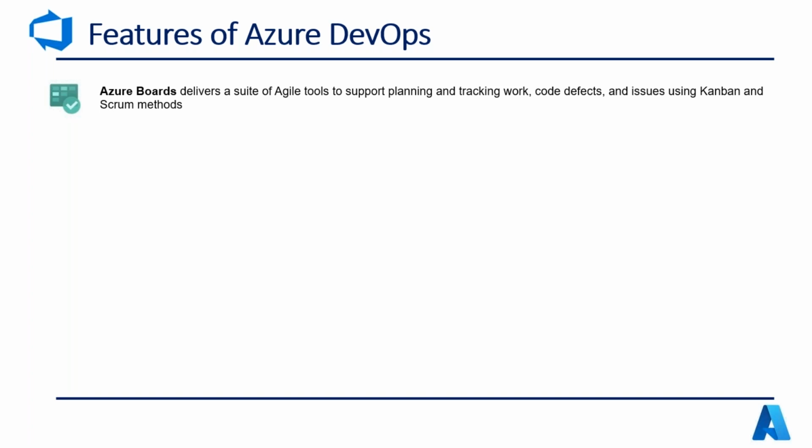But today we are following a model called Agile, where we release features every sprint, so every 15 days or every 30 days. So we can define a sprint. What is a sprint? A sprint is a time frame. Mostly in today's industry, we take 2 weeks as a sprint. So every 2 weeks, we make sure that we release some features to the customer and take the customer's approval on whether the product is going in the direction he has imagined. This is called the Agile model.